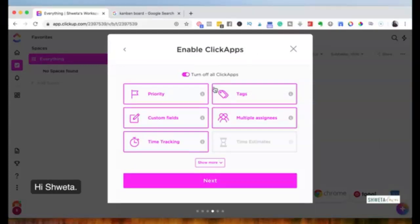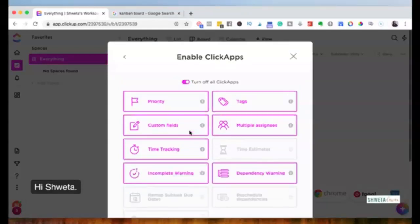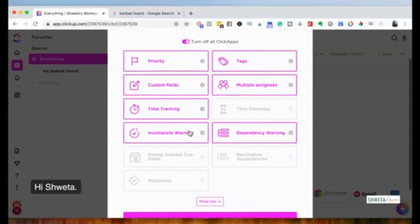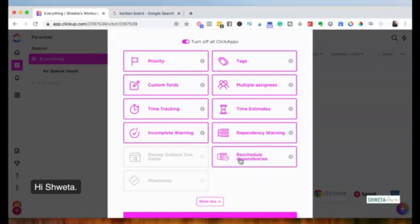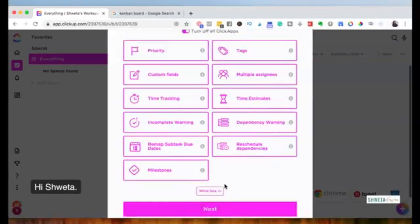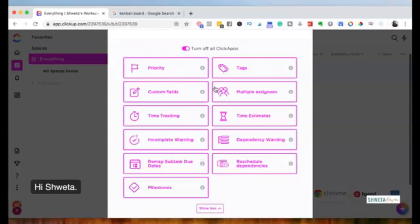ClickApps are different functions you can enable as part of your ClickUp dashboard. I'm focusing on the basics today so you can go through this process and understand it. You can add tags, set time estimates, or set up dependencies — for example, if your VA creating a graphic depends on you writing the blog post first. I'll select all ClickApps since having them enabled doesn't hurt even if you don't use them.